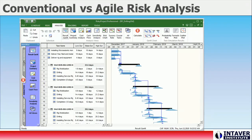Conventional and Agile project management have different conceptions of scheduling. Conventional schedules are composed of tasks with durations that are linked in a precedent network. Importantly, task durations are considered variable and can change during project execution. Schedule risk analysis measures the impact of this variance on project plans. To start the analysis, risks and uncertainties are assigned to the project plan.